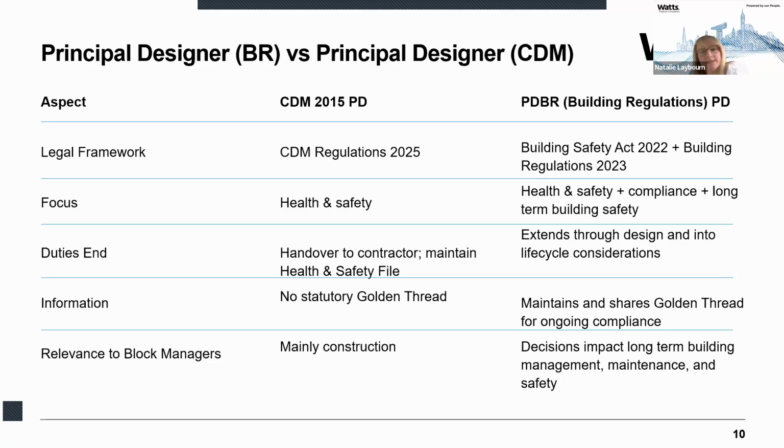Having looked at the role of the principal designer under the Building Safety Act and Building Regulations, it is important to understand how this differs from the CDM 2015 principal designer. Under CDM 2015, the principal designer focuses primarily on health and safety during the design stage. They coordinate designers to identify and manage risk before construction begins. While their active duties mostly end at construction handover, they are responsible for preparing and maintaining the health and safety file, which contains information necessary for the safe operation, maintenance, and eventual demolition of the building.